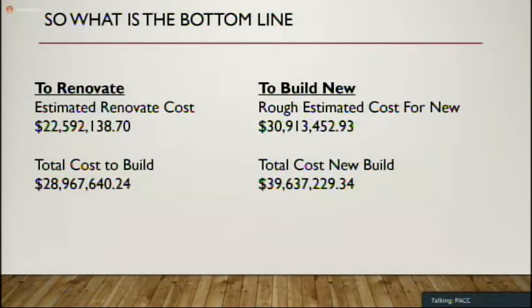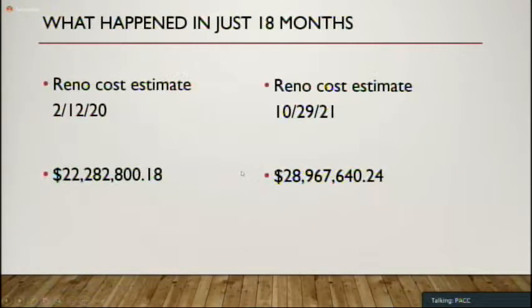That's of course come down a little bit, but there are other things such as gypsum and wire and pipe that are contributing to that, as well as a general increase in labor costs due to labor shortages. That's how they came up with that acceleration. So I just wanted to mention to everybody that the architect is giving us real-time data and real-time visibility into what they're seeing and what the contractors are seeing in the field.